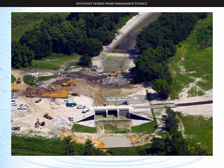This picture right here was during demolition of the old structure, and you can see this is right before they demolished the old structure. You can see there's a lot of water upstream of that structure. Here it's drained. The contractor used an aqua barrier upstream of Saddle Creek. Basically, it's a big balloon that's filled with water and sits across the river, and again, we were fortunate enough to get good weather during that time, so we completed the removal of the old structure.